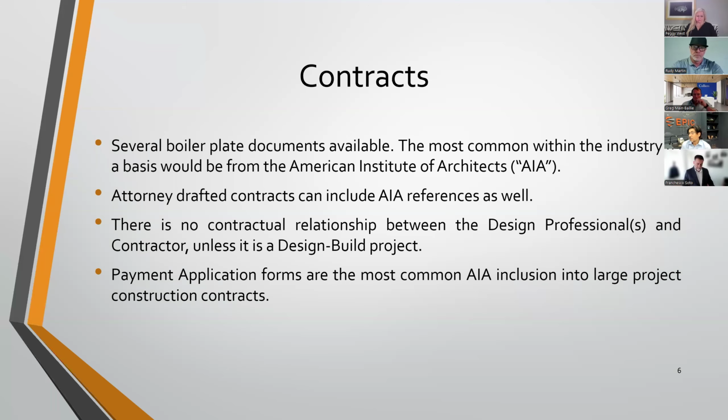The alternative is a design-build project, which essentially means that the owner is only signing one agreement. In the same example, the owner signs an agreement with Rudy, and then Rudy and I have an agreement together. Design-build is a bit more generic as far as the project is concerned. Using a pool, for example, the owner says, I want a redesign of a pool. Rudy says, sure, no problem, I'll do the rendering and all the actual construction. Theoretically, nothing should fall through the cracks, is the generalized intent.